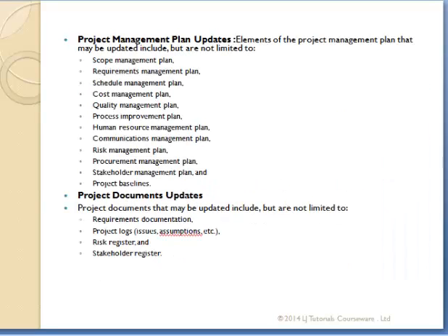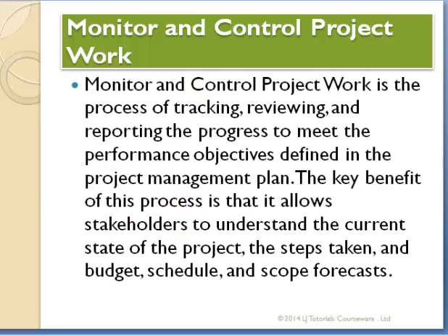Then also we'll update our project management plan, because whenever a change occurs on a project, it can impact our cost, quality, HR. So you update these documents. And also you can update some project documents like environment documentation, project log, risk register, and the rest. Now we go to the next subdivision, which is the monitor and control project work.